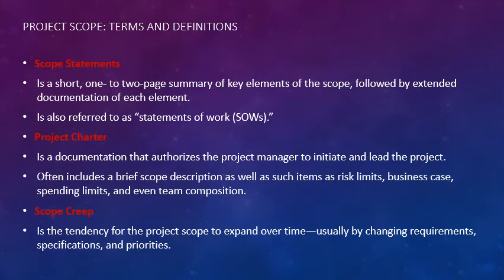So a lot of the times, because I come from a purchasing background, when we would scope out what somebody was going to do for us, we would give them the statement of work, and then they would quote out that work. And that would be what would be expected of them when we sign the contract.